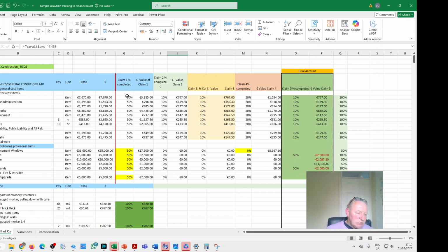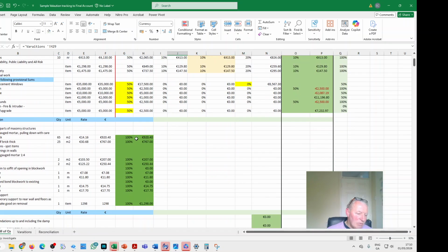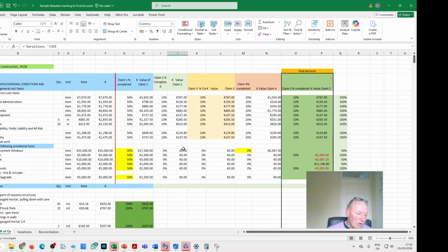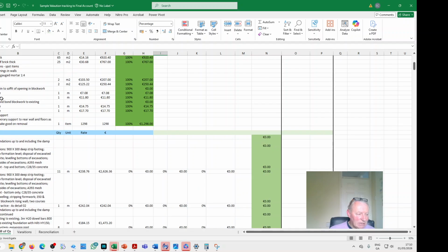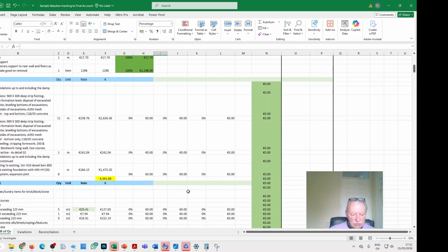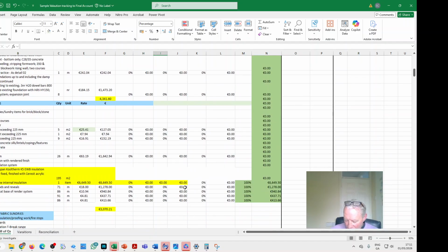So he was adding up. Instead of claim 1, he just had cumulative totals. But he wasn't even taking away how much was last certified. So he was kind of putting it all in my head. And that's fine. A little bit unusual, because it slows up the process, takes me longer, and his builder doesn't get paid as quickly. But then I had to break it out per month. I had to analyze it. And then I analyze every single individual bit to make sure he's not overpaid. And a tiny little bit overpaid is usually leveled out with the next month.